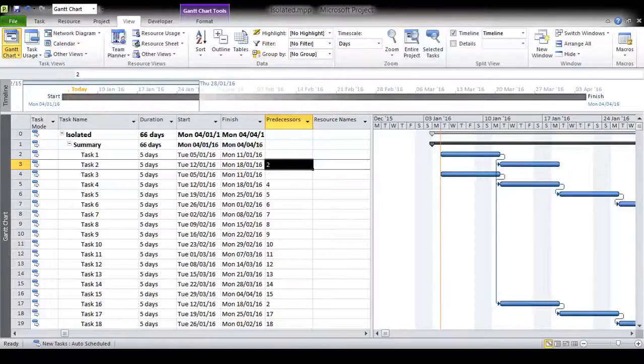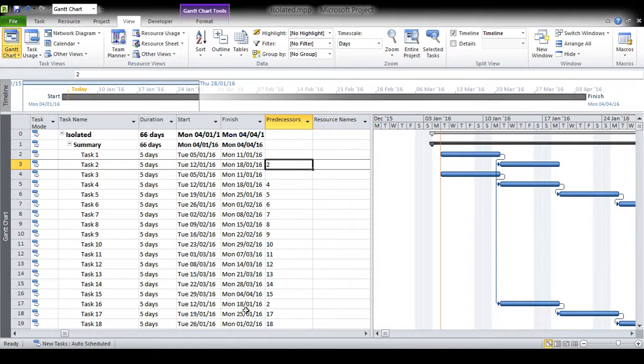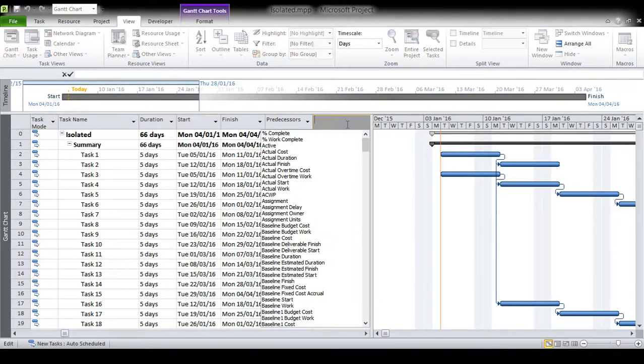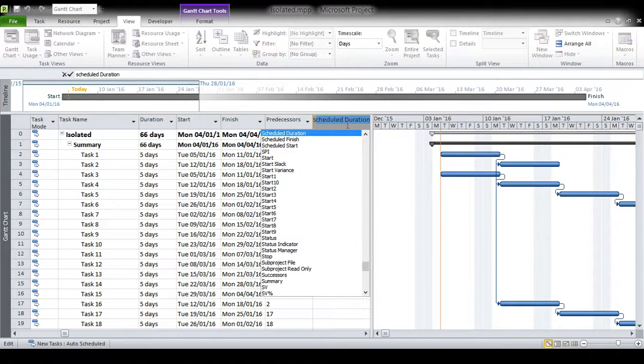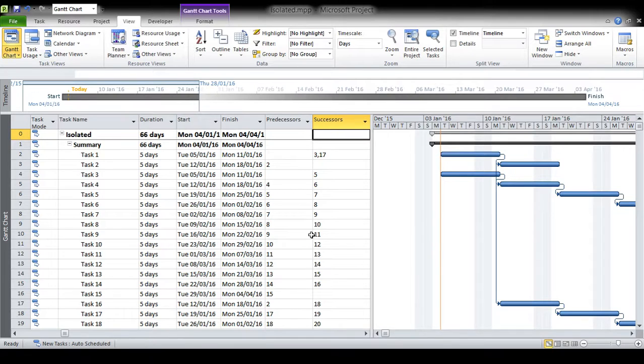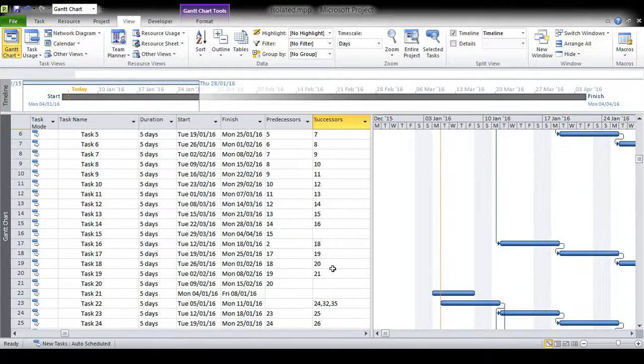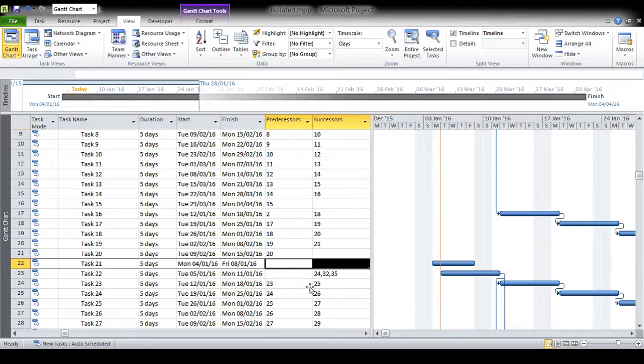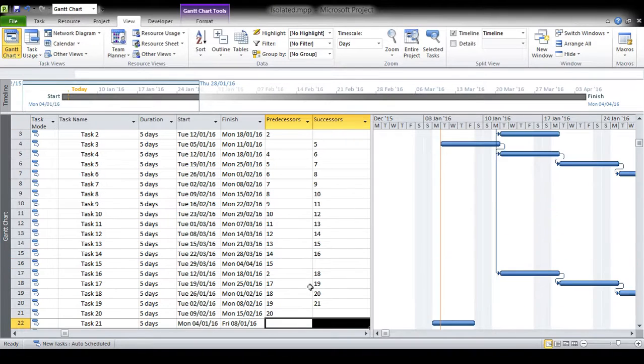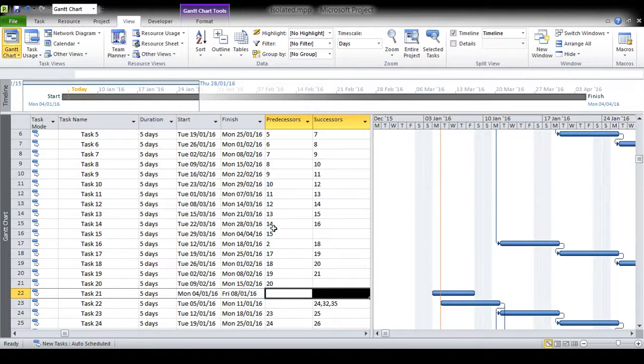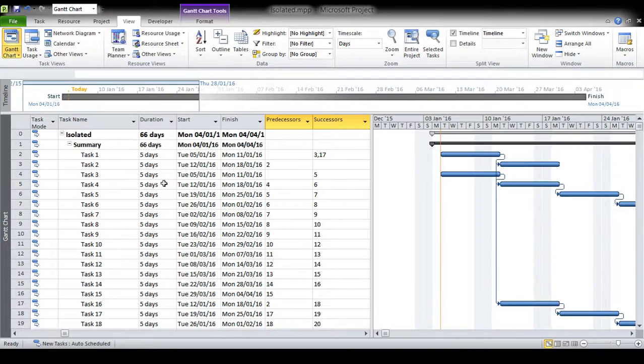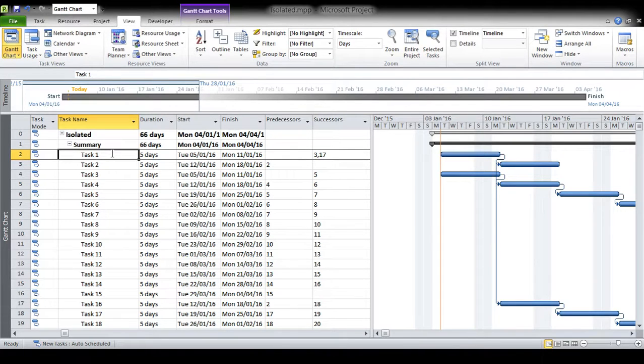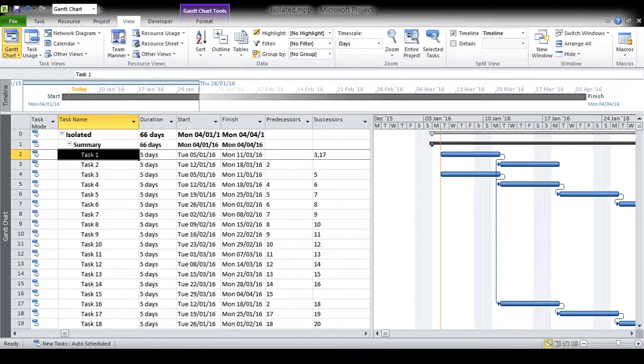So here's my little example Microsoft Project Plan, which as we can see has some dependencies set. We have predecessors listed here, and we can see the links on the Gantt chart. I'm just going to repurpose this column to show successors as well. So what we are looking for are activities which don't have any predecessors or successors set, and which are therefore isolated from the rest of the activity network, and there's one such example here. Now for small projects, it's not too much of a deal to go through manually and check for this, but for projects where we have many thousands of activities, this can be quite time consuming. So what we are looking for is a quick way of identifying these isolated activities.